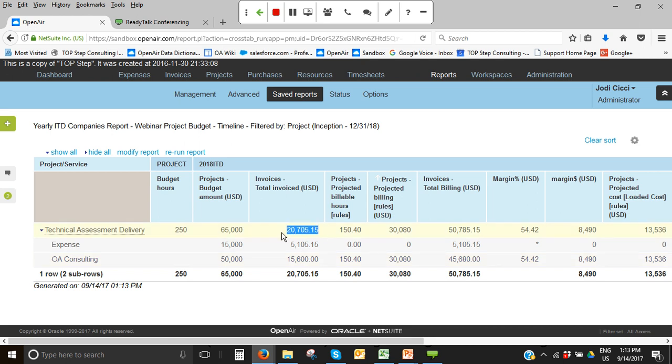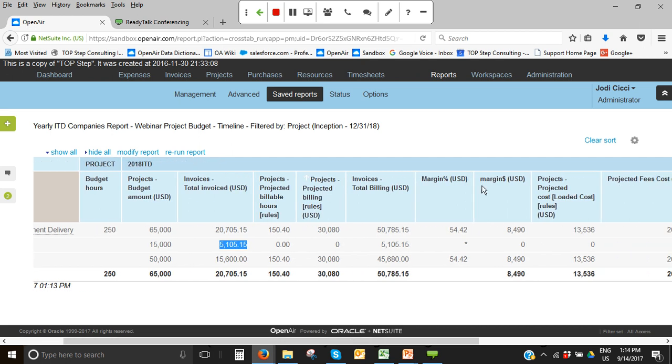Just because I burned 30% or 33% of the budget does not necessarily mean I'm 30% done. I'm probably about a quarter of the way done with labor, but I've only burned like a third of the travel type stuff. So it gives you a little bit more information about what you're tracking. Okay. And then I also threw in some custom calculations to factor in margin. So margin is based on actuals at this time, the amount I've invoiced, the cost of those items, and then being able to factor in what the percentage is to date of the project.